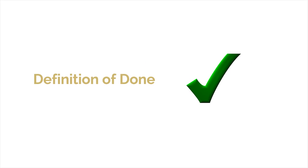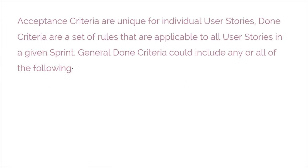The major difference between done criteria and acceptance criteria is that acceptance criteria are unique for individual user stories, whereas done criteria are a set of rules that are applicable to all user stories in a given sprint. As with the acceptance criteria, all conditions of the done criteria must be satisfied for the user story to be considered done.